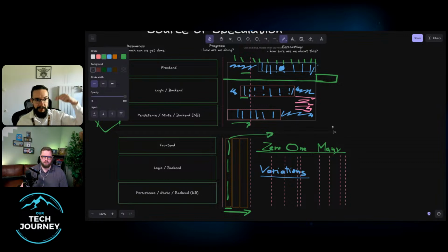What does that tell us about our understanding of the problem? Maybe we should be working in smaller slices. And then gradually, when you make them smaller, they will overlap sooner. And then you can say, okay, even when we're working horizontally, what does one overlap look like? And can we plan work for tomorrow in such a manner?